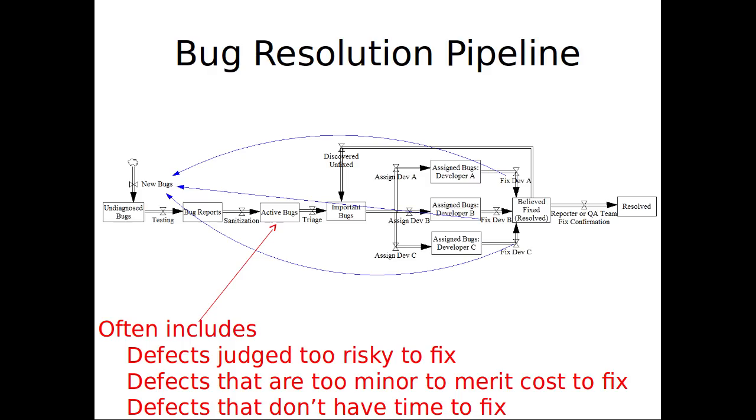First of all, by so doing, by fixing it, there might be new bugs introduced. And so you really want to test after that to make sure, you don't just say, oh, okay, the system is down one less bug. No, in fact, there may be new bugs circulating because of those fixes.